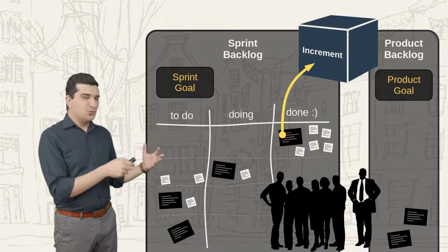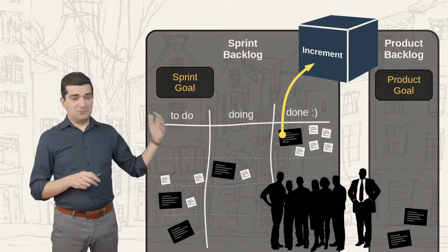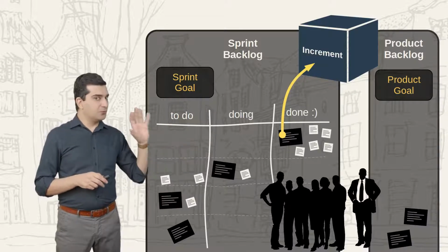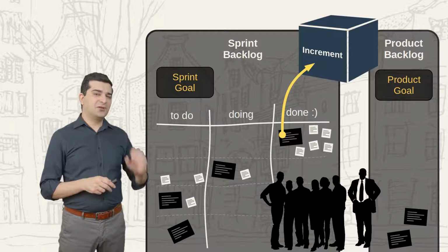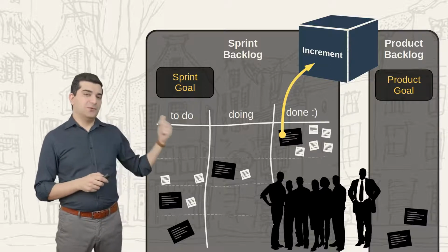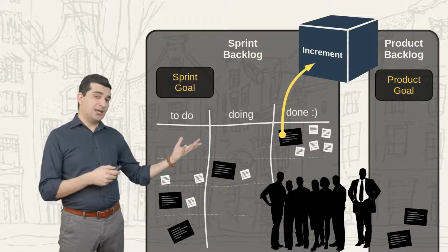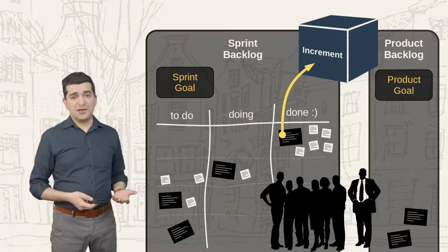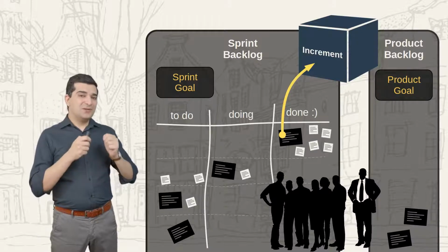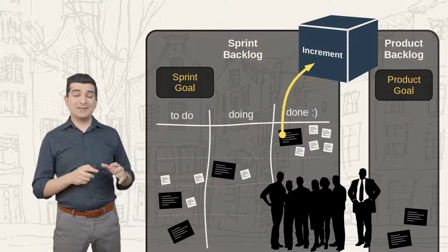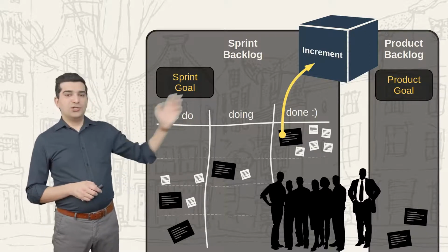You can spend, for example, 2 more hours and completely finish it and then put it there. But if you don't, in 2 months from now, you will run into some mysterious problem. And you may have to spend hours after hours just finding out that it was because of this. And then again, you have to spend a lot of time understanding how it was working and then fix it. So it's not justifiable. It's a lot easier if we really commit to having 100% done items when we put them into the increment. And that's why we have a definition of done.